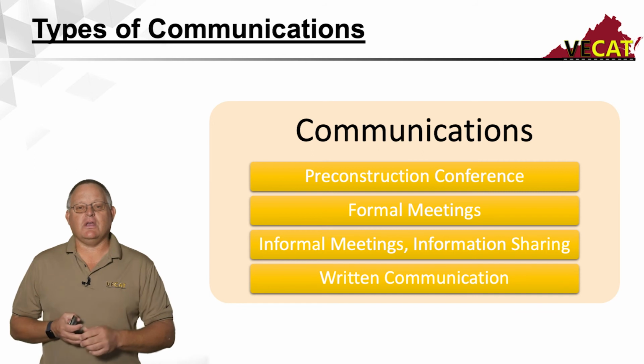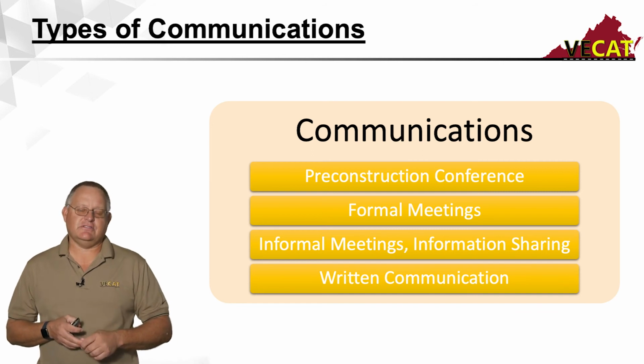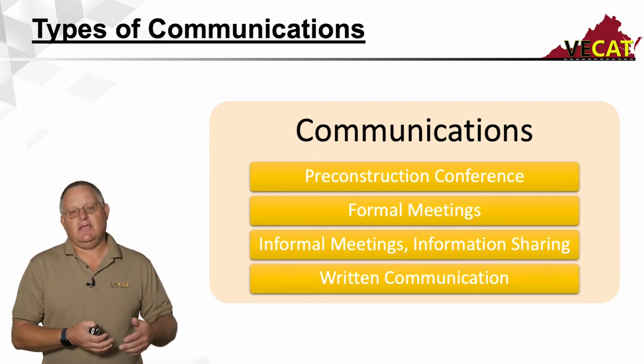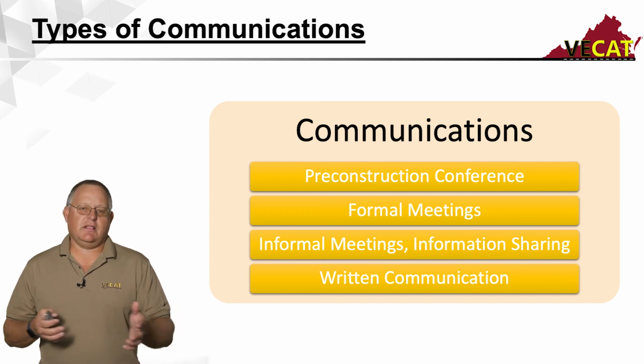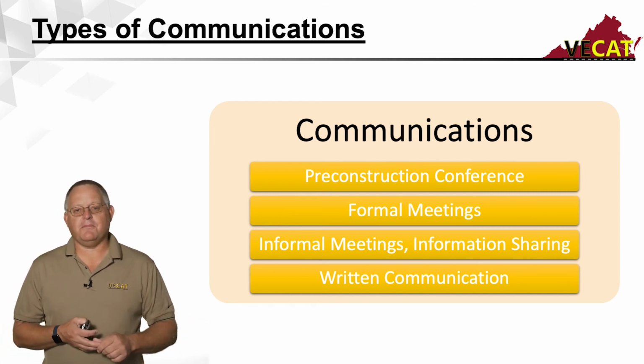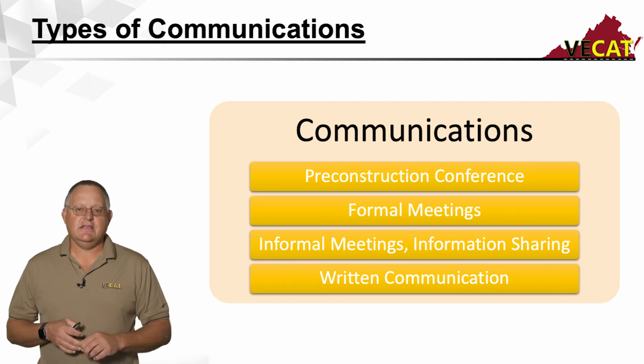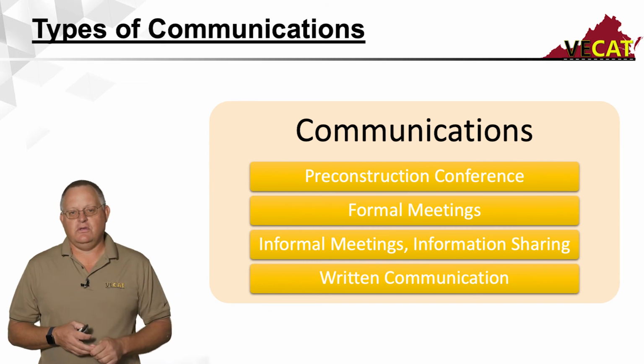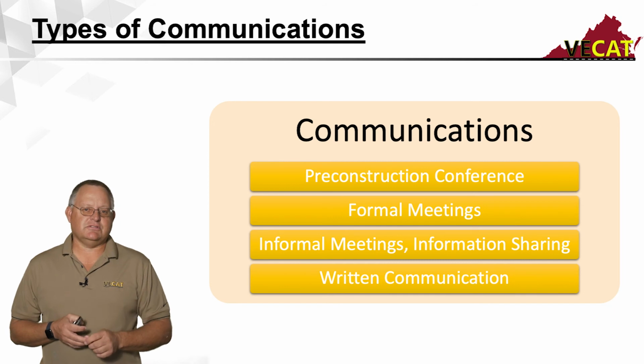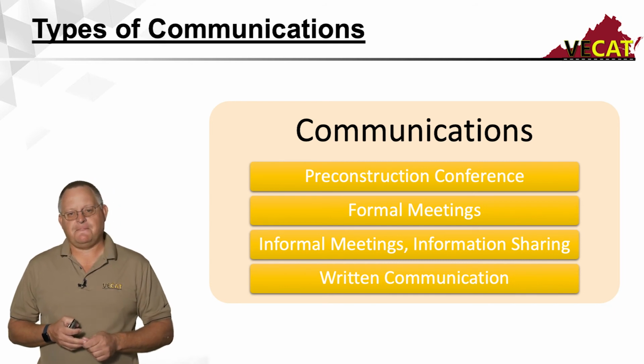That's typically where a lot of the discussion unique to that project is held. There's a lot of discussion between the contractor and the department on how the contract is going to be executed, some types of the timelines. So that pre-construction conference is one of the first things that we do when a job is being executed, and that can be where some of the nuances are discussed.